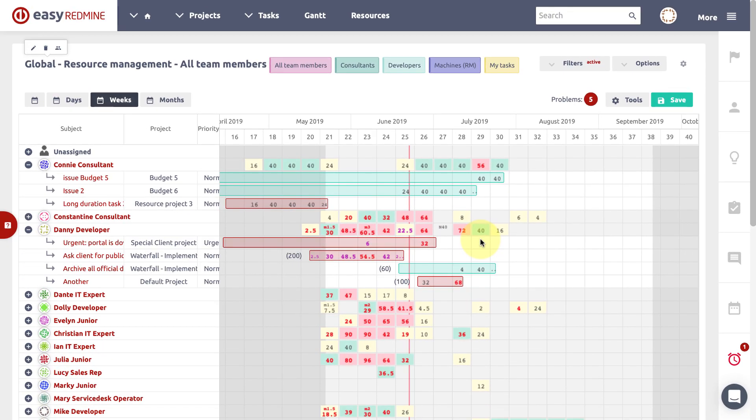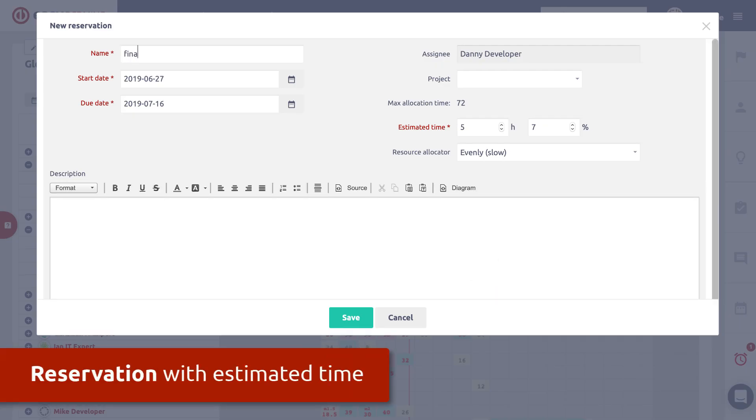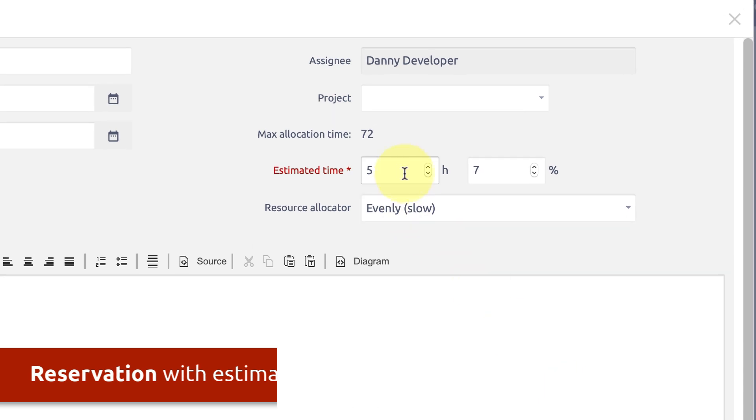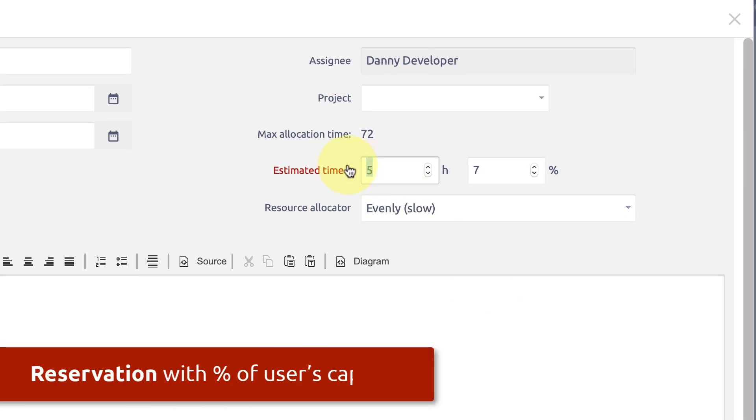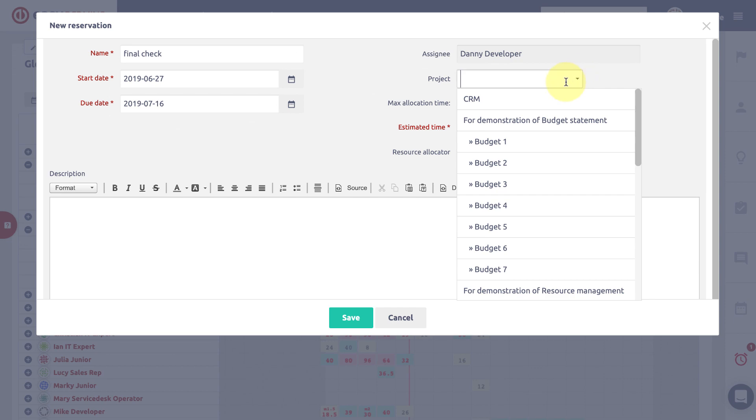Newly you can just drag the mouse on a user to create resource reservation. You can create a reservation with estimated time or in percentage of users working capacity. You can also assign a reservation to a particular project.